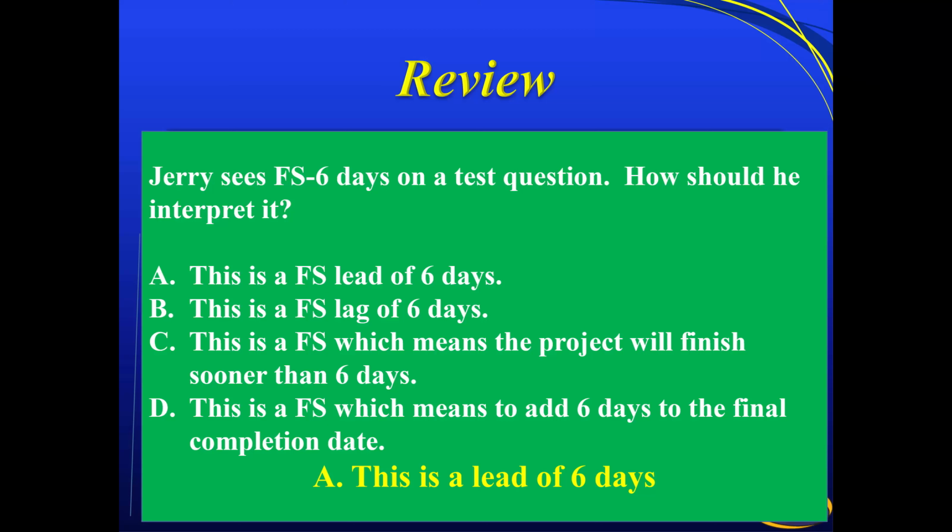Remember, an FS is a finish to start minus 6, which means you're cutting 6 days out of that lineage. So this is a lead because you're cutting 6 days out of that lineage. Okay.